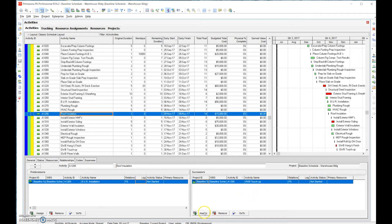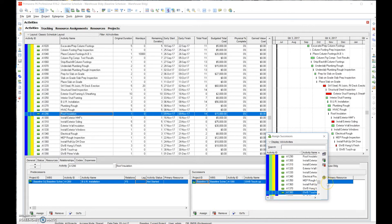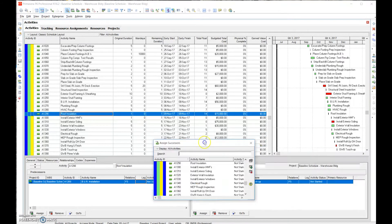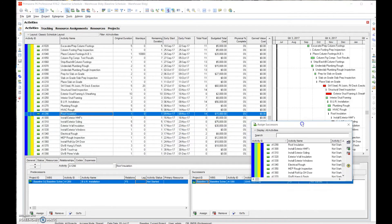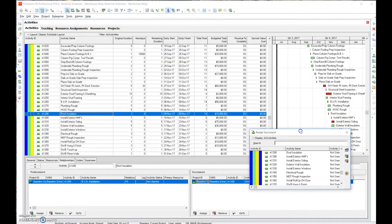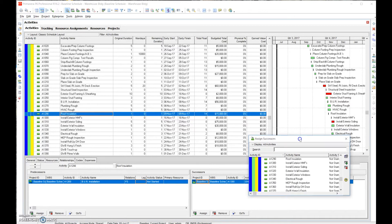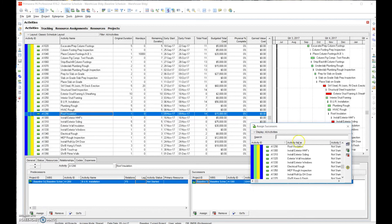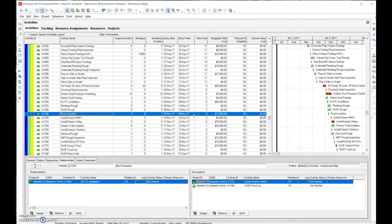Looking through the schedule logically, after roof installation we'd expect to have 'install exterior siding' as a successor — and we were missing that relationship. Once we add 'install exterior siding' as a successor to roof insulation, the float drops from 14 days down to 5. So by going through the excess float numbers, we can clearly identify activities that are missing relationships.